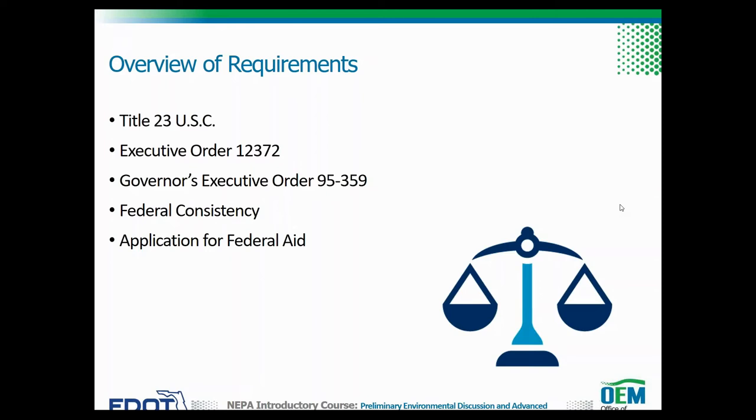Presidential Executive Order 12372 of the 1982 Federal Register promotes intergovernmental participation and requires lead agencies to communicate with state and local elected officials as early in the program planning cycle as is reasonably feasible.